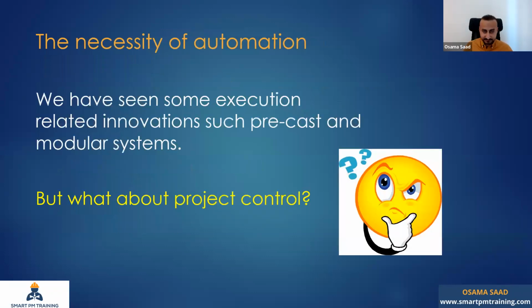But what about construction? I'm sure it's the case in IT as well, but in construction, we see innovations every day. We have the precast model in construction. We also have modular systems, so more innovations to make our life better and our projects more effective. An example of a modular system is pods, if you know about it. It is like building a whole bathroom outside the project, then you deliver it to the project and you just fix it. It works perfectly if you have a super large construction project. I personally worked on a project that had pods, this type of innovation, because it had three super high-rise buildings, so it was efficient to do so.